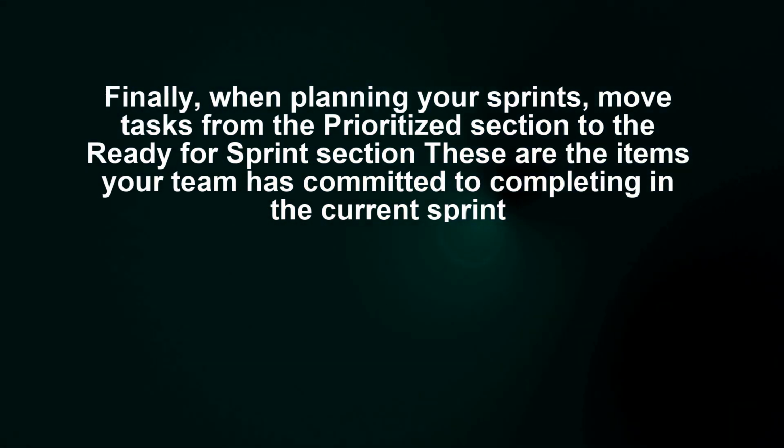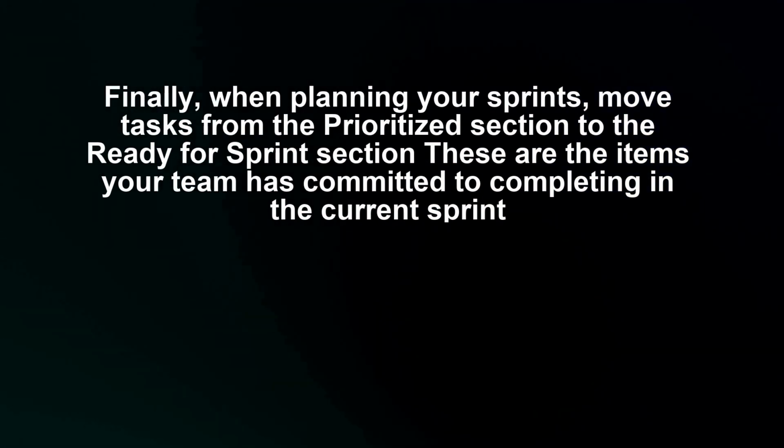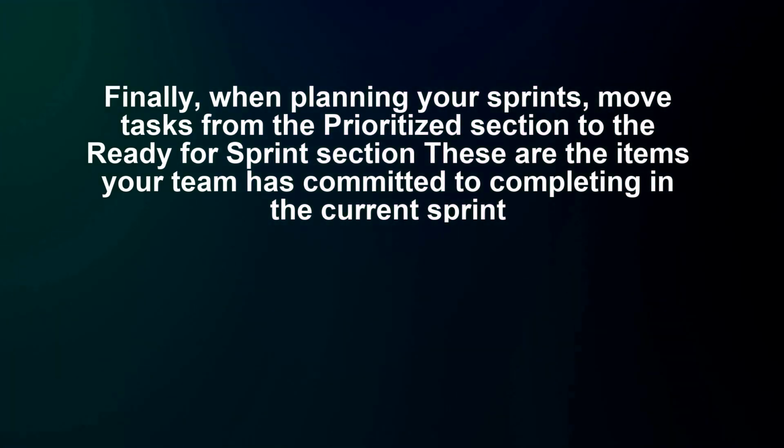Finally, when planning your sprints, move tasks from the prioritized section to the ready for sprint section. These are the items your team has committed to completing in the current sprint.